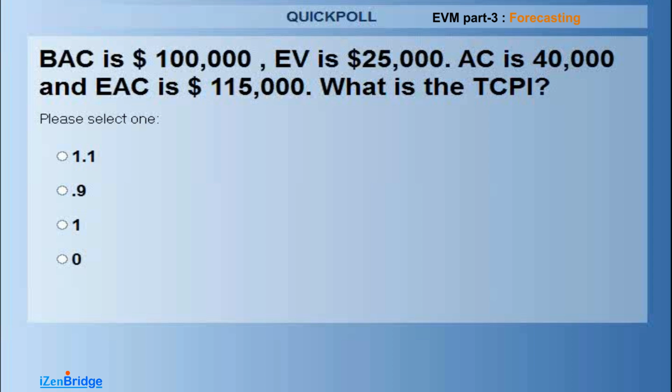And look at it logically. The estimate at completion is always a sum total of actual cost and estimate to complete. Estimate to complete is all about this: if you think the variance was one-off, you are not going to increase the budget for the remaining work. So you are just taking the remaining work budget as per the original plan. If you think the variances are going to be continued, you need to factor that variance into your future work, or remaining work.